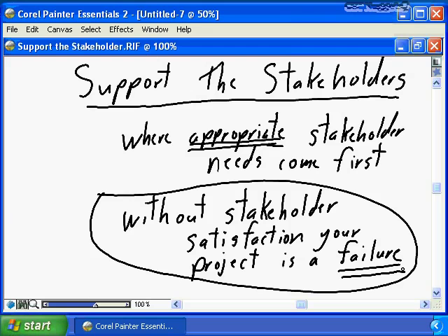But we need to satisfy the stakeholders. So we say, yes, stakeholder, I understand your business requirements have changed. I understand the economic environment has changed. I would be more than happy to change our project from X to X prime or from X to Y. Here is the impact to the project scope. Here's the impact to the project time. Here's the impact to the project budget. If you would be happy to approve this, then I'm going to continue on the project. And if the stakeholder says, no, I can't approve that, there's no money, then you stop the current project.